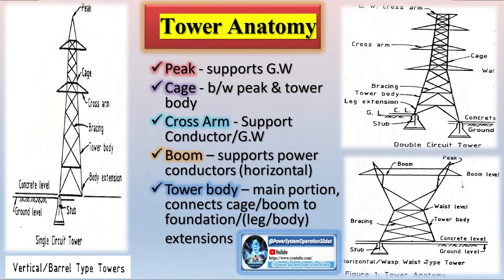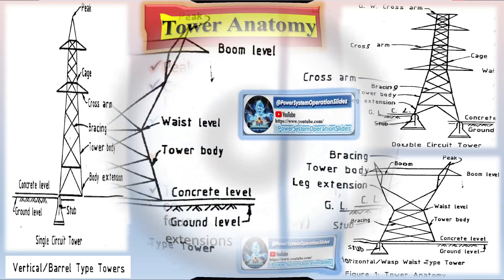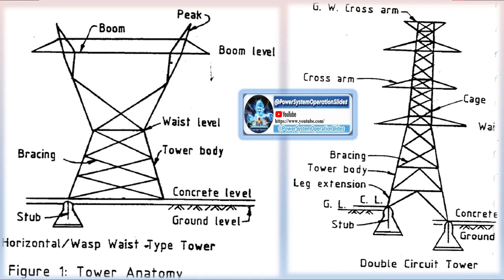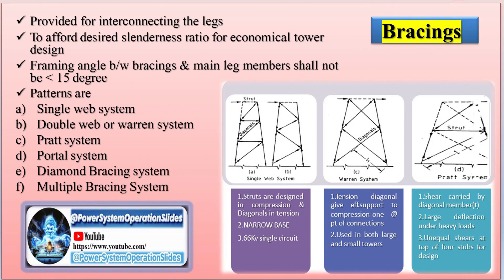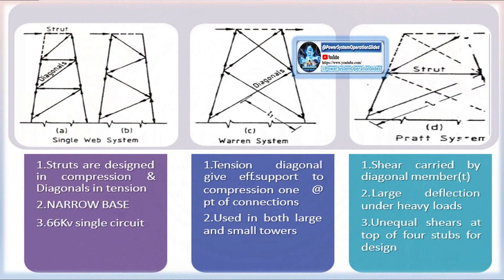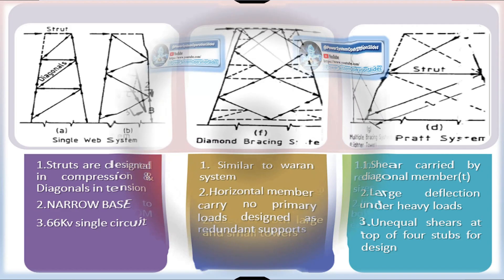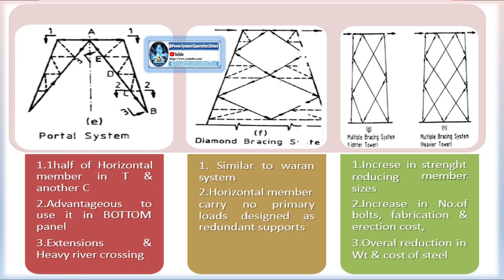The full tower schedule is finalized after the entire transmission line route has been surveyed, soil investigations have been completed for all tower locations, and the foundation and tower designs have been validated. The full schedule includes the tower layout for the entire length of the transmission line, specifying the spacing between towers, the type of tower (suspension, tension, or special towers), and the required foundation type for each tower. The schedule also accounts for factors such as wind loads, conductor sag, electrical clearances, and terrain variations. Once finalized, materials such as tower steel structures, conductors, insulators, and foundations can be ordered and transported to the construction site.